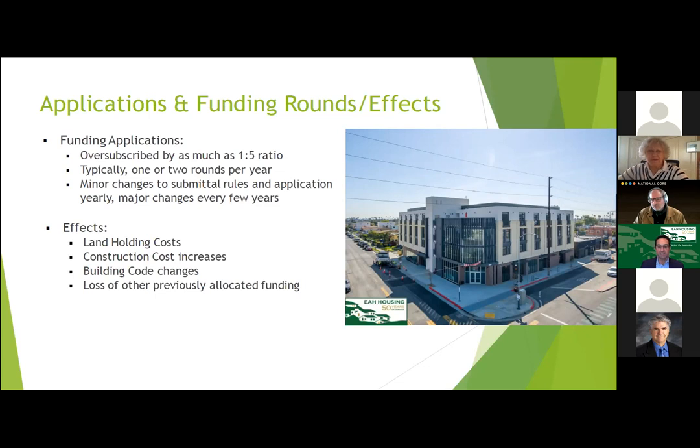And as you might guess, this has effects beyond delaying the housing from starting construction. Our land costs go way up. We often acquire the site when we first identify it. So there might be 3-4 years of acquisition loan interest. Construction costs can go way up. Building codes change, and then on occasion, we might actually lose one of our sources that said you must start construction within a certain amount of time in order to get our funding.